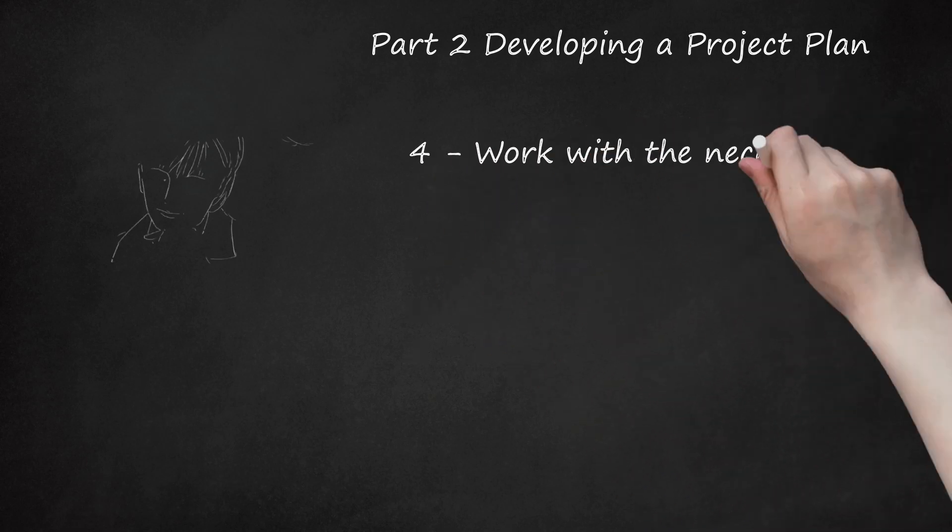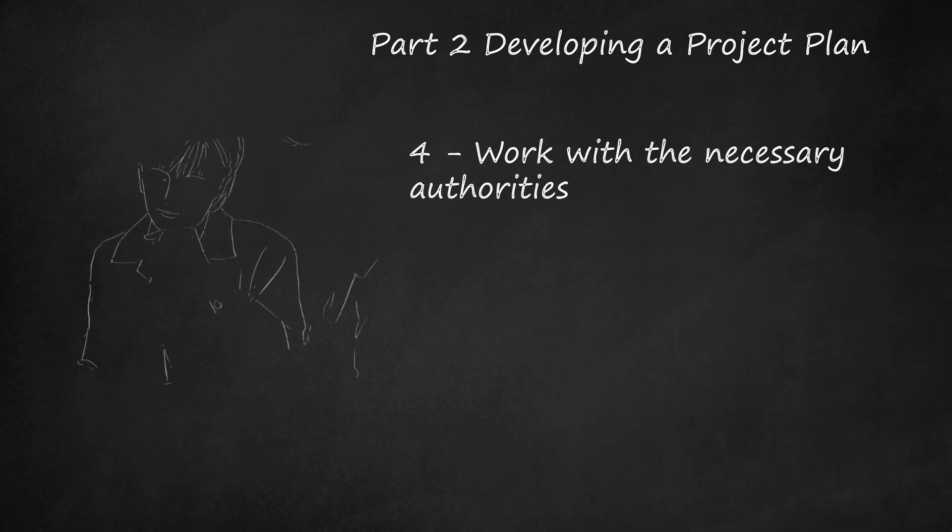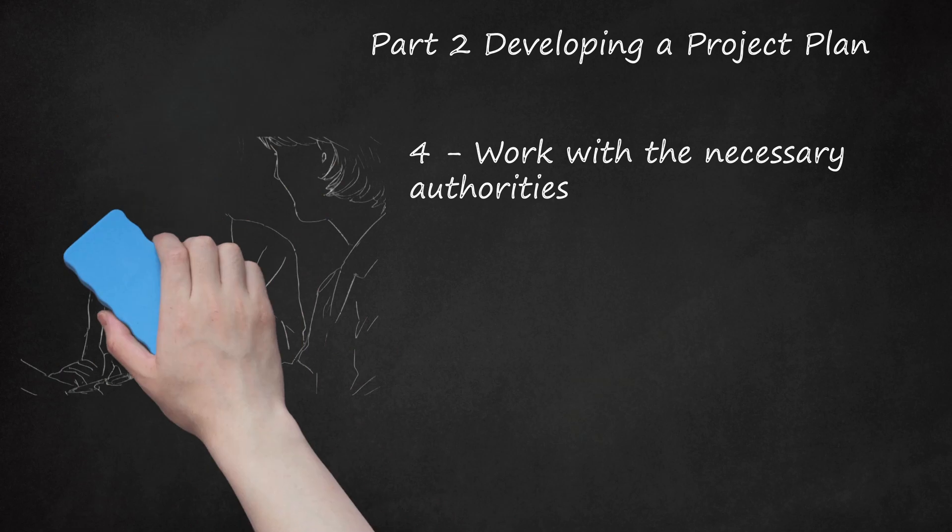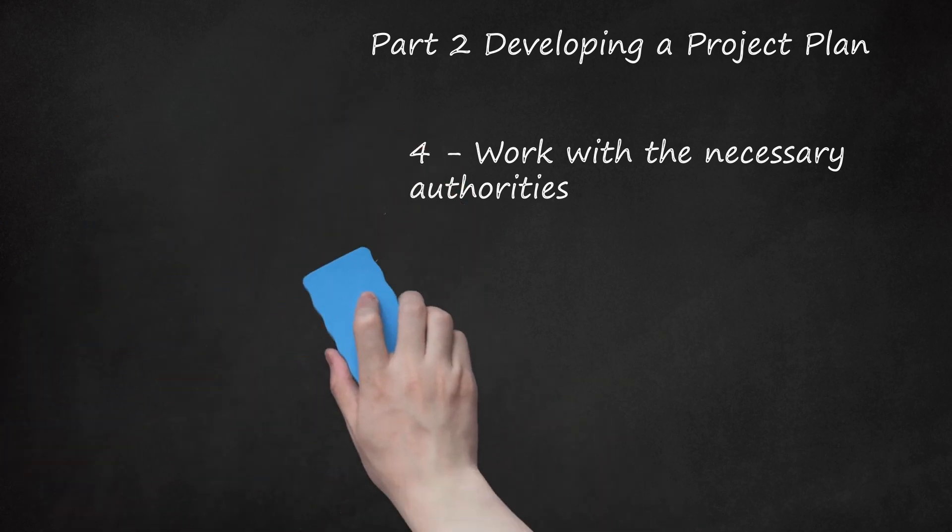Step 4: Work With The Necessary Authorities. For this part of the project, you need to work with the heads of several departments to decide what is appropriate to demand for deliverables. Set up a way to work with the necessary authorities and processes to gather information. Typically, department managers are reluctant to provide access to those outside, so an agreed-upon authority and access is needed up front.